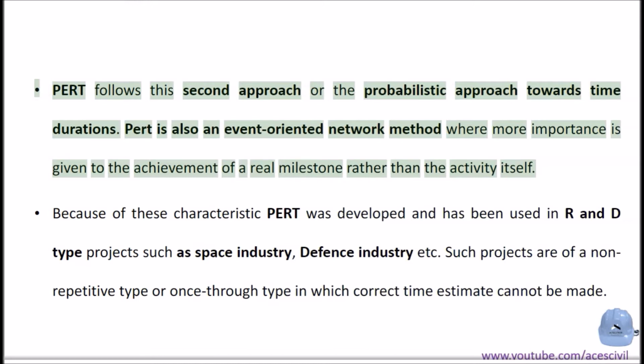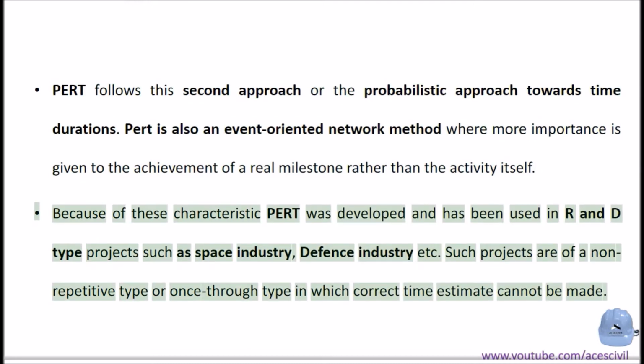PERT is also an event-oriented network method, where more importance is given to the achievement of a milestone rather than the activity itself. Because of these characteristics, PERT was developed and has been used in R&D type projects such as the space industry, defense industry, etc. Such projects are of a non-repetitive type or once-through type, in which a correct time estimate cannot be made.